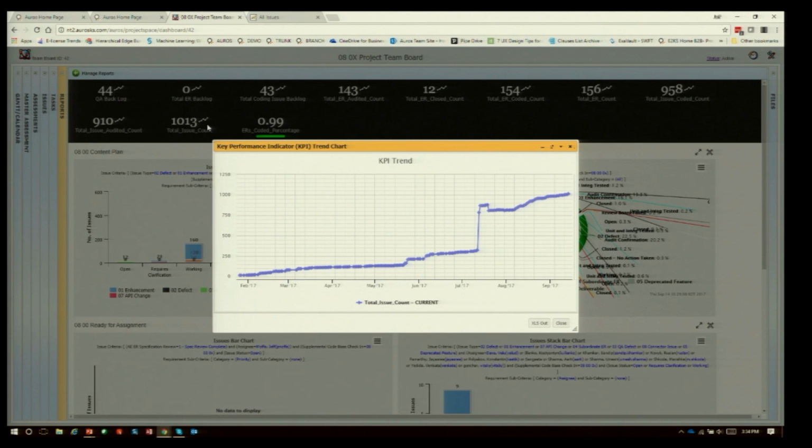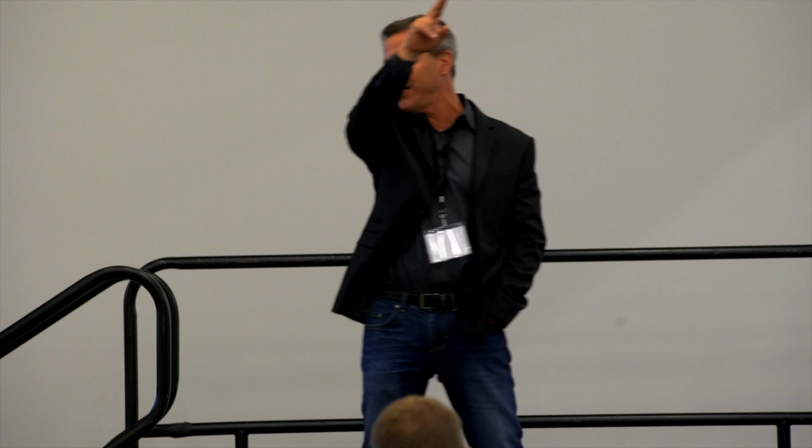So in software, how many people else do software? Any software guys over here? So there's the idea of burn down is really important in software, right? You start with a content plan. And during certain sprints, you're burning down the amount of work that needs to be done. So what that looks like is a reverse of this chart, and I'll show it to you in a second. But what's important is that your objective is not the same on any given day because it's decreasing every day.